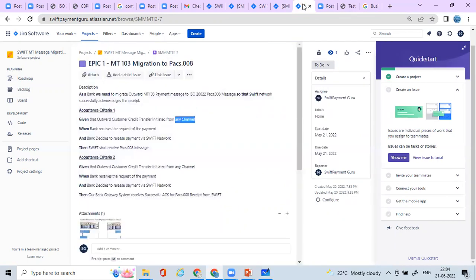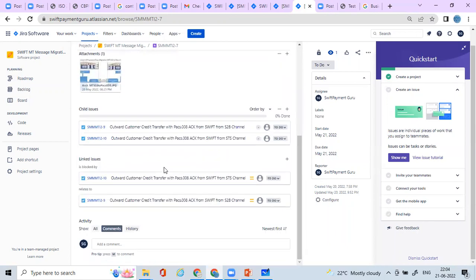multiple user stories, splitting, right? So whether you do it with horizontal slicing or vertical slicing, that all depends upon your project work. But basically, you will do the vertical slicing, wherein you would have the test of all those layers, not only with one layer development, but from a small part from each of the layers, right? So under that, you can write down the user story.